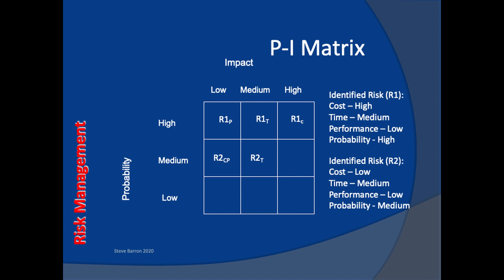Another risk, R2, here assessed as medium probability, has cost and performance identified as low risk. So these components are grouped together in the low impact, medium probability cell. The medium time risk is plotted in the middle cell.